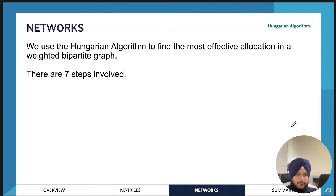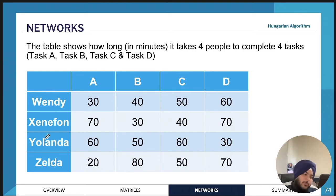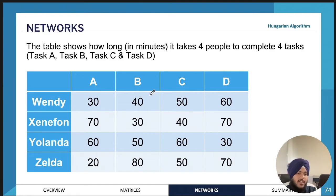Now we'll look at the Hungarian algorithm, which has seven steps. We use the Hungarian algorithm when there is a time associated with each task. In this table we have four people working on a project with four tasks, and the time taken by each person in minutes is listed. For example, Wendy can do task A in 30 minutes, task B in 40 minutes, task C in 15 minutes, and task D in 60 minutes.